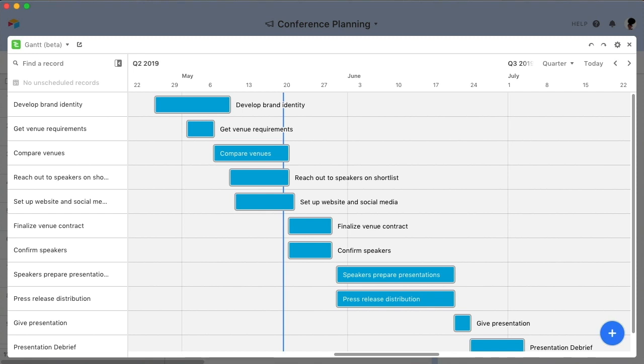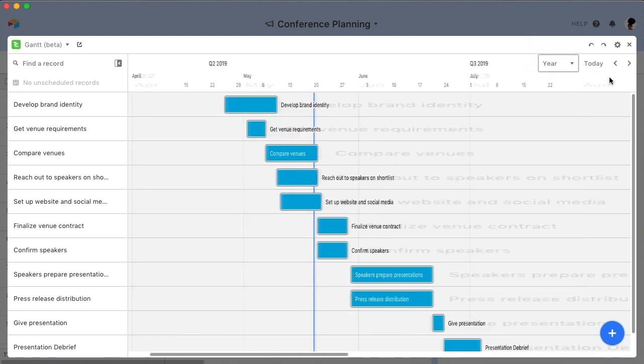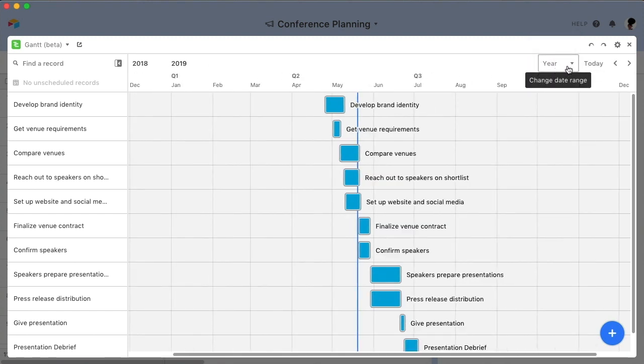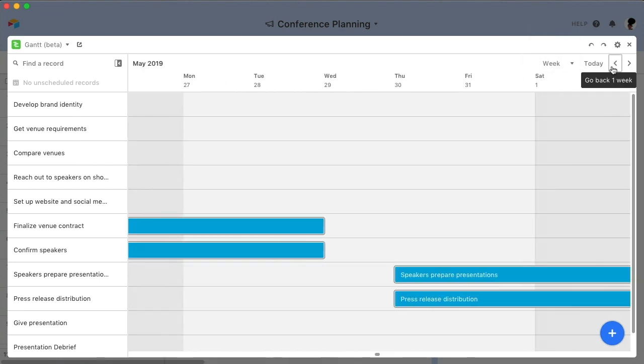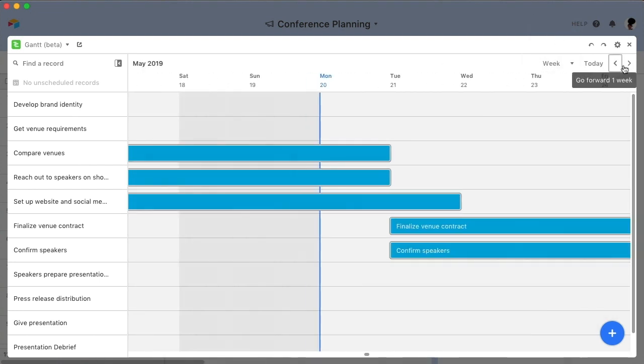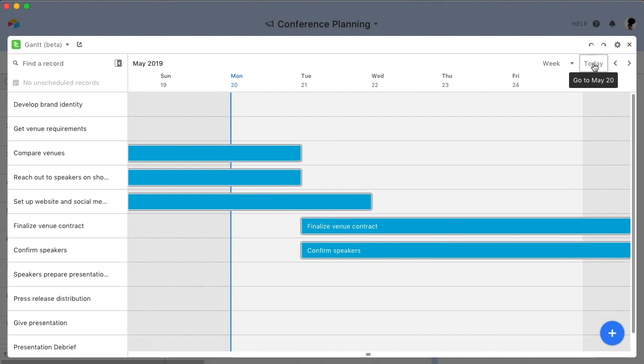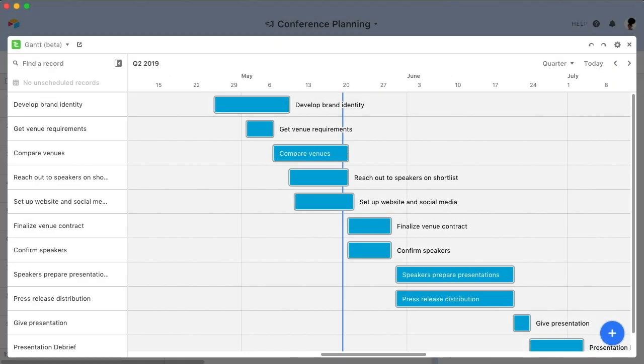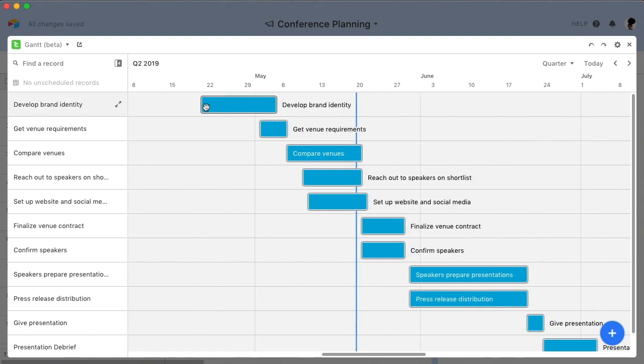You can change the timeline to show a variety of different durations, from an entire year to a single week. The arrows let you move backwards or forwards on the timeline. There's also a handy Today button, so you can shift the Gantt chart to show the current date. And if you want to adjust the start or end date of any record, simply click and drag the bar to your liking.